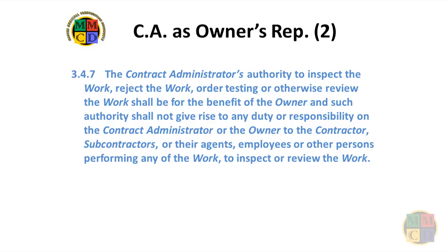Even when a CA is appointed who is not from the design firm, the CA has an obligation as a construction professional to involve the designer whenever the CA has concerns about design parameters or assumptions. If the CA works for the design firm, finding a problem with the design can put the CA into a conflict of interest between his or her duties for the owner and those for the design firm.